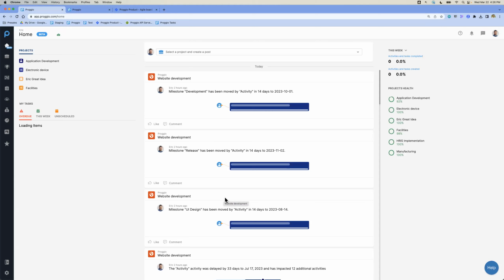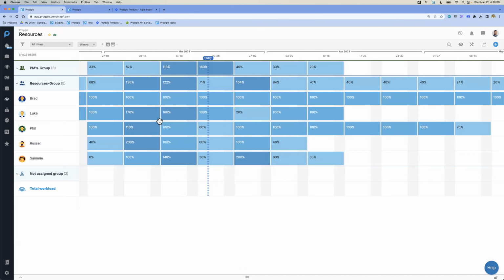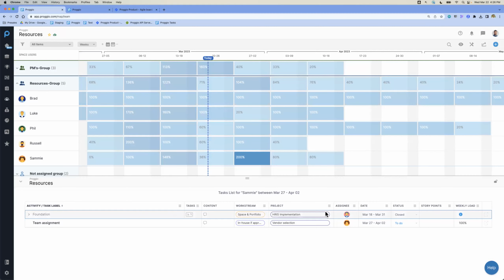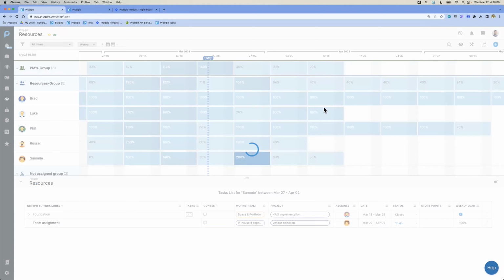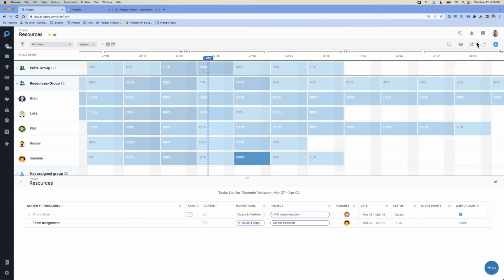All right. Now, next is being able to look at our resources. And as we look at the resources, you want to be able to plan and see, hey, do we have folks that are overburdened? We know utilization is super key. Do we see some of these overburdened time periods during a week that we could then go and reallocate to different resources by changing the status, pull up the information and see what their workload percentage is, maybe add someone else and change their percentage to half of that, if you will.